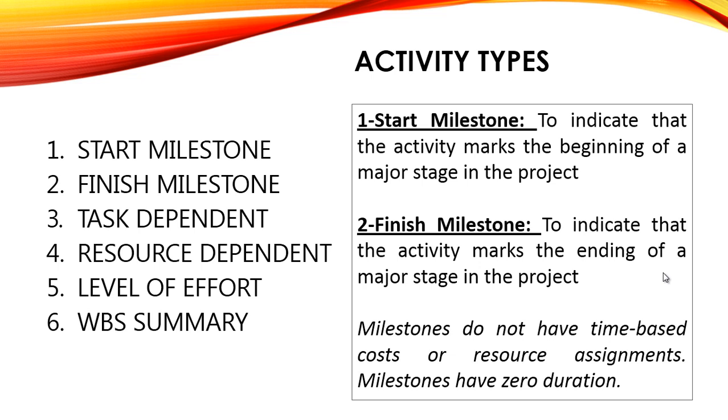For example, to initiate the project we have a kick-off meeting with our clients, and at the finish milestone we will do the inauguration ceremony for the completion of the project. At these locations, or in any related condition, a zero duration activity will be used in Primavera. For that purpose we will use start milestone and finish milestone.